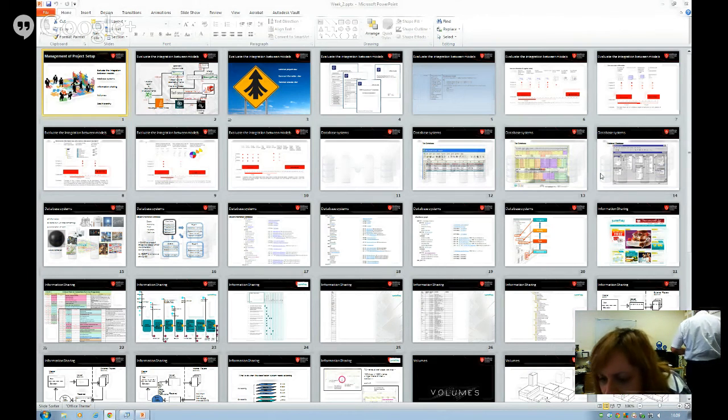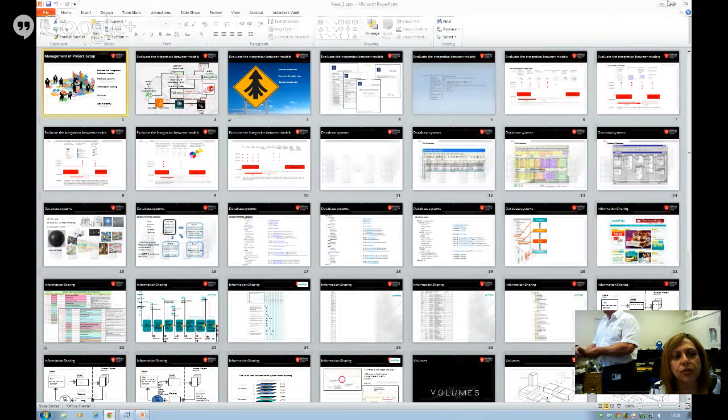Tanushka asks: if there are different standards, how do you know which standard to follow for which type of project? Good point. Well, you have to decide at the very beginning what standards you're going to use with the other disciplines and with the other people in the supply chain. It has to be created and written properly right from the start in the BEP, and it also has to be identified in the employer's information requirements, as I'm going to say now. As long as everything is set out right from the start and you know which standards you're using, then that's fine.